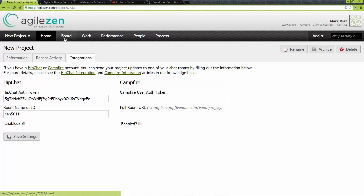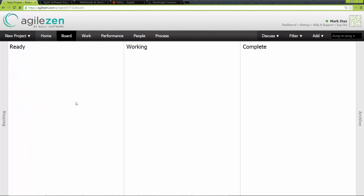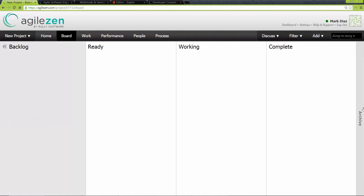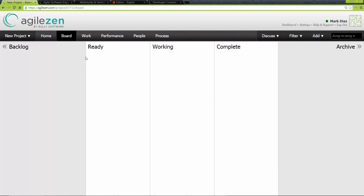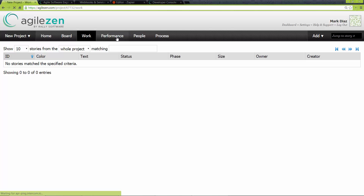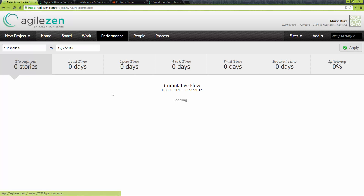Let's look around. Clicking on board will take us to the Kanban, which by default is outfitted with ready, working, and complete, as well as a backlog and an archive where completed stories go to live. The work tab is just an itemized look at all the stories in your project. The performance tab gives you the velocity as well as other metrics. It's important to note that, as AgileZen is focused on the Kanban methodology, it has no concept of an iteration.